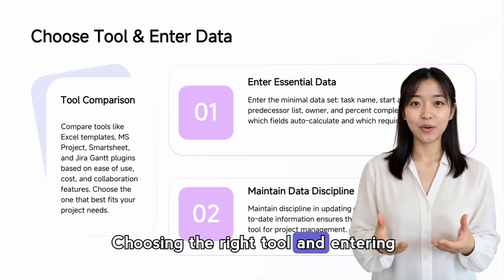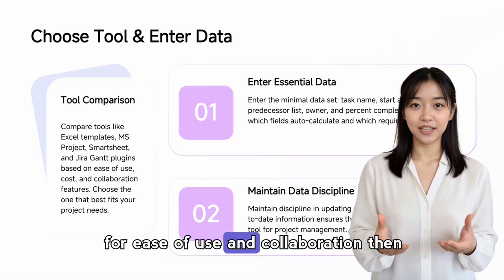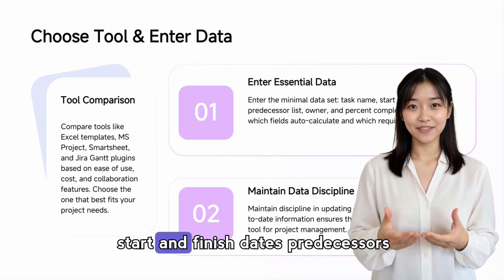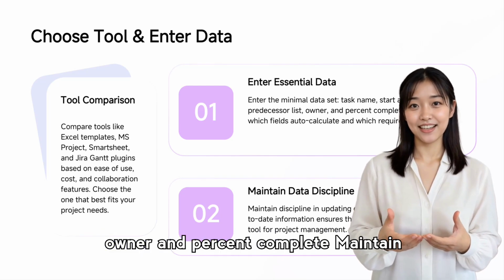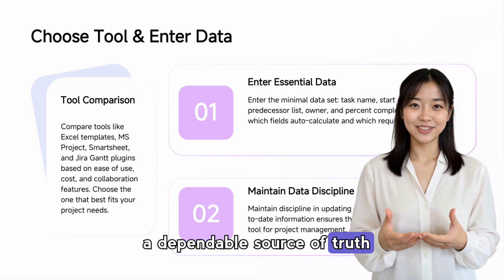Choosing the right tool and entering clean data are critical. Compare tools for ease of use and collaboration, then enter essential fields like task name, start and finish dates, predecessors, owner, and percent complete. Maintain discipline in updates so the chart stays a dependable source of truth.